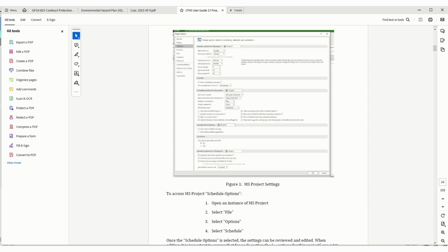What a duration or milestone will help you with is this a contractor or not a contractor? If it's work we're doing, then we don't have to necessarily use it as a duration. This will mostly be for HVAC, fire suppression, anything else that's out of our control. You can put that it's going to be done by others. You would write down here, being done by contractor. And then you could put the number of days it's going to take for that contractor to complete the task. Whether it's 45, 60 days, 2 weeks, 1 week.